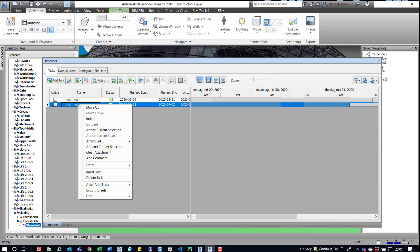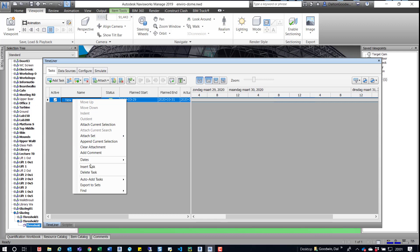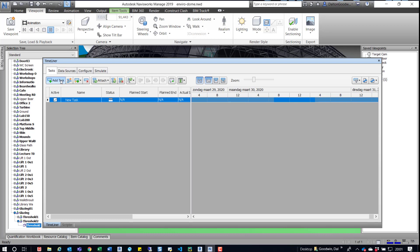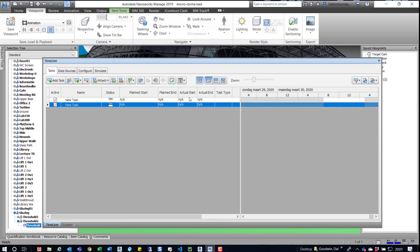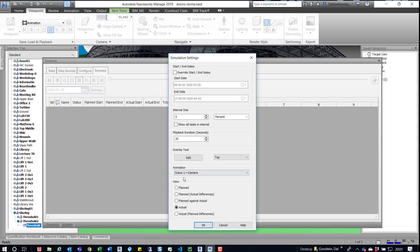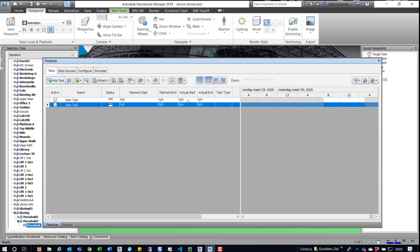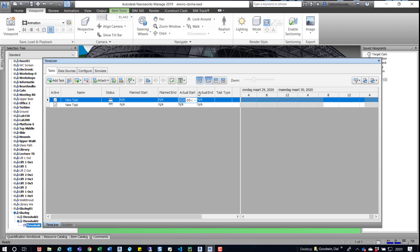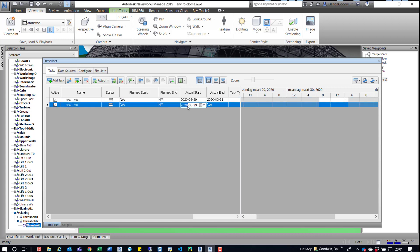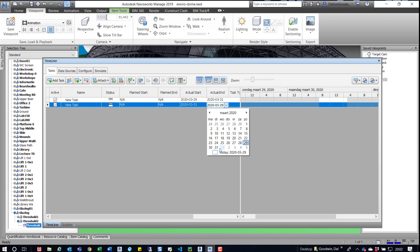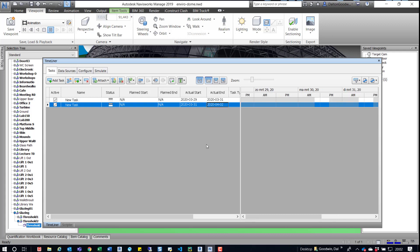With the Timeliner window open, I'm going to delete these tasks. I'll delete that task and then this task. Now I'm just going to manually add two tasks to this project. The actual start date and actual end date is what's being used — if we go to Settings we can see it's using the actual start date. We'll go into the actual start date, leave it as whatever it shows up as, then go a couple of days ahead — to the 31st in this example. For the second task, we'll start it at the actual end date of the first task and set the end a few days after the 31st. Now we have our tasks created.